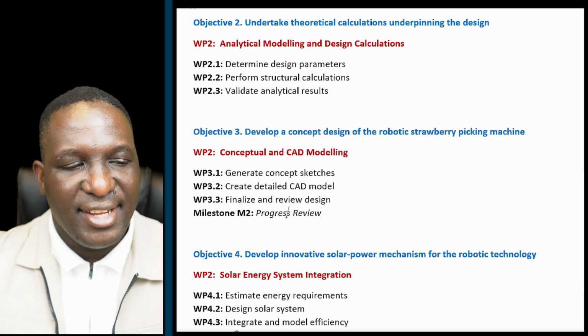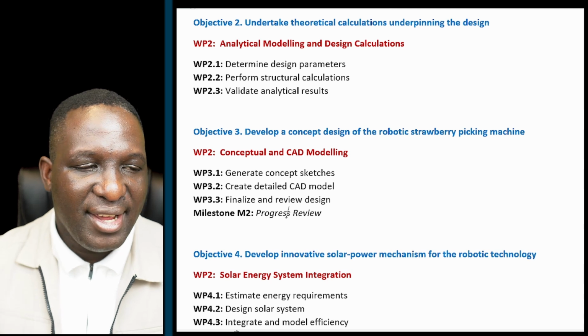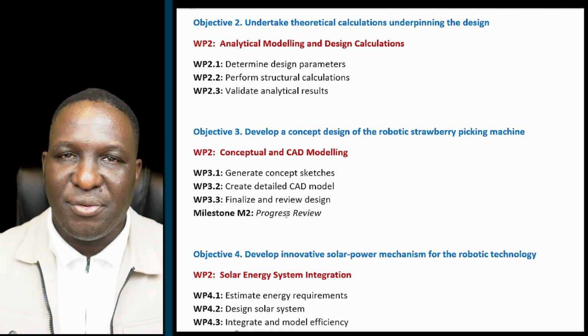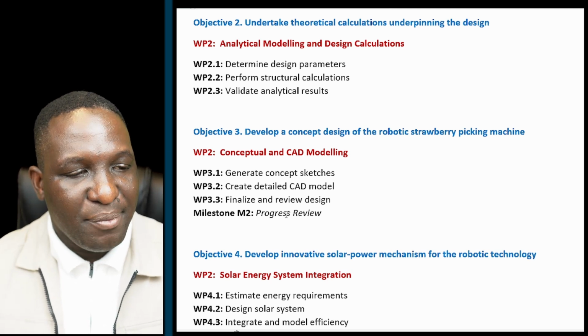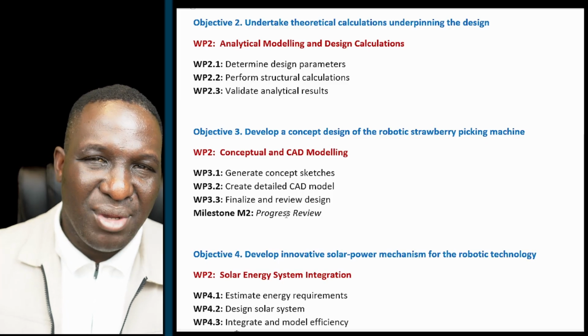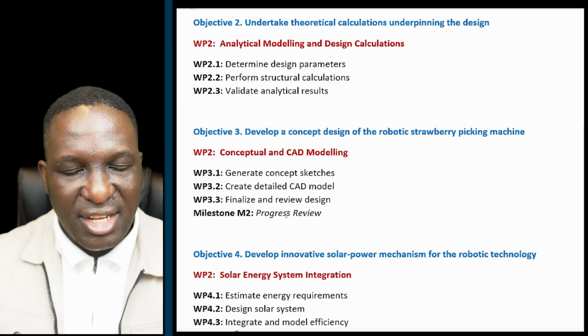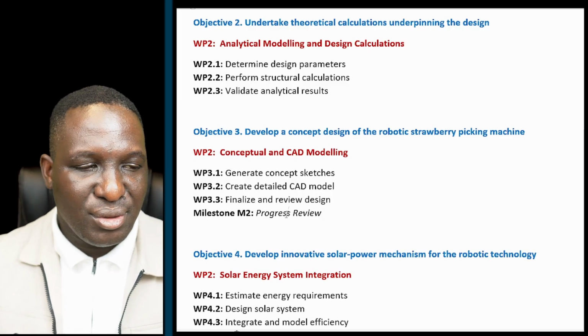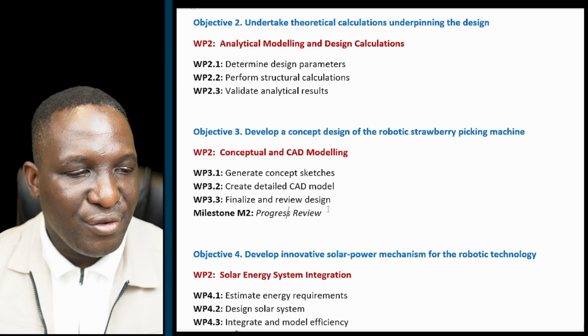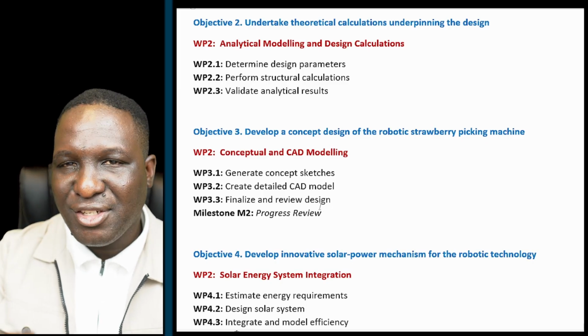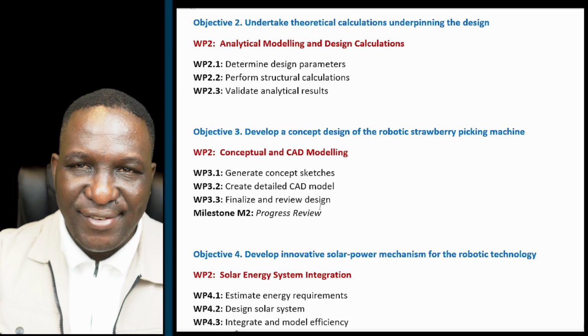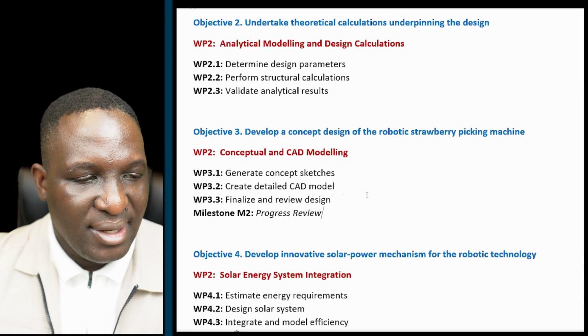And then at this stage, you'll probably want to review your progress, again, maybe with the manager, with the supervisor, with the assessment panel, and that becomes a milestone. So this could be in form of a group presentation, an individual presentation, or a report that you will generate. So this is a progress review as the next milestones. And the milestones are dated. So you're going to put dates, specific dates where these things are going to happen as a way of managing your project.